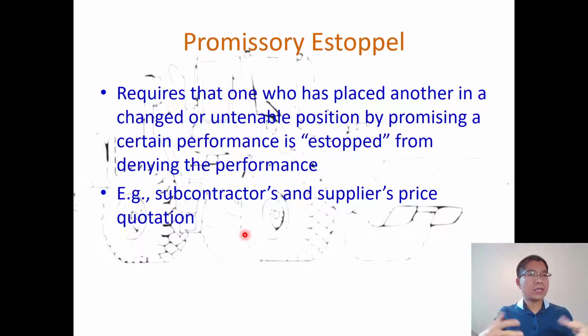When the general contractor prepares a bid, it is not expert in all of the work. I do the work, I prepare the bid, I call the MEP, mechanical, electrical, and plumbing contractors. Give me a quote for this project, and they give me a quote. I rely on that subcontractor in my bid. I put that number in, and then I got the contract.